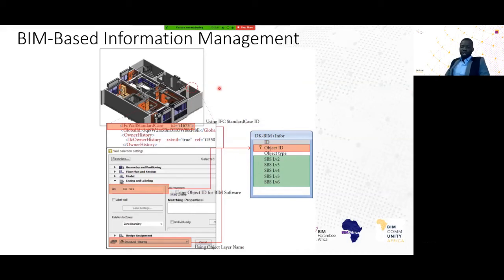So once the BIM model and the construction information database are connected, construction information can be accumulated through each object of the BIM model, and it can be retrieved at any time for verification. For example, we have a wall member here. If it happens after construction that there's a crack forming on a wall, the general construction information and all other necessary information about this wall can be checked through the space breakdown structure.